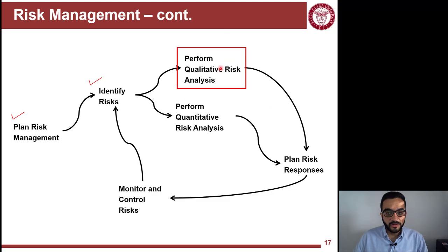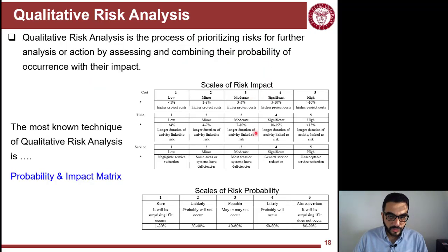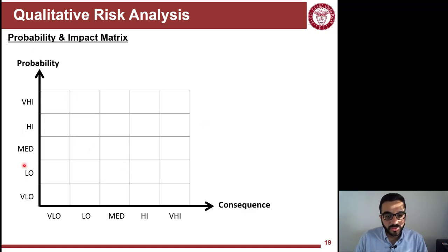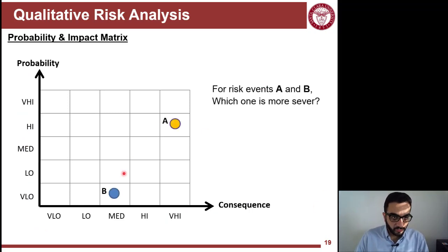And then after you identify the risk, you perform risk analysis. So based on the scales that you set as the tools for you to use, now you use them for every risk you identify. You start assigning, this is from the cost perspective, it's a significant costly event, or from the time perspective, it's a minor time impact. And also you assess the probability here. Once you do that for every risk, now you start plotting them in the probability chart, the matrix. So for probability consequence matrix, for probability you have very low, low, medium, high, very high probability, and a similar scale for consequence. Now once you start plotting these risky events, for example, A and B are risks that you identified,